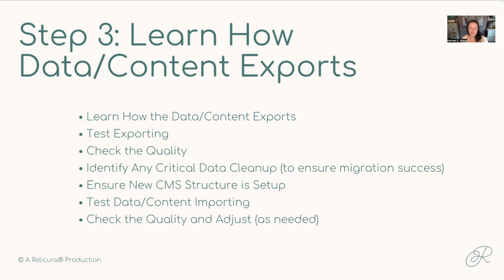Do test data and content importing, so test the shape of the data and content you have getting into the new system to see if you need to adjust exporting, and then check the quality and adjust as needed. So it's going to be sort of a trial and error, especially for the first couple of times. But getting to know the shape of your data, how it comes out, and what shape it needs to be in is incredibly important for this implementation process.